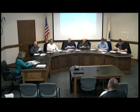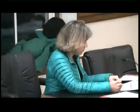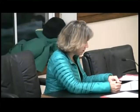67 is as-built of anything that's right up against the 50, drafted in conjunction with the applicant's consultant, picking out segments of walls that are right next to the 50. The only thing I added was there are 2 stormwater outlets that Lisa had called out that are really close to the 50. We want to make sure those don't wind up inside the 50. But that's basically just the proximity to wetland thing, not just survey control. Right.